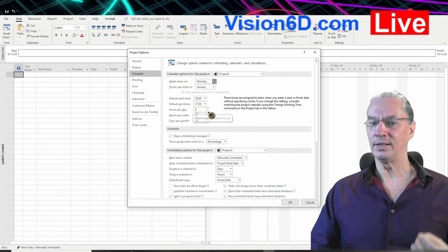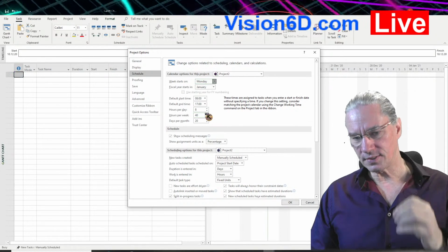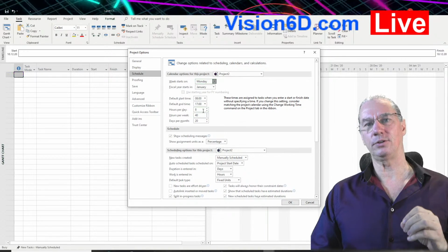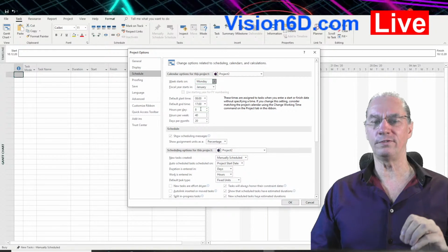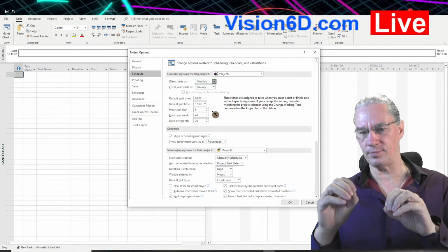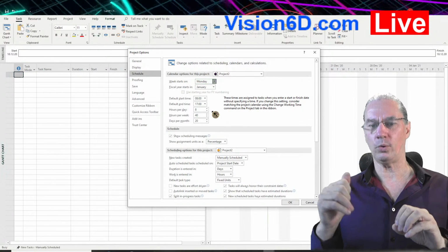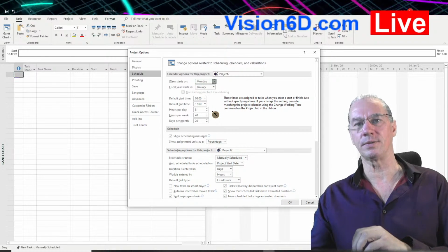Later on, if you decide to come back, it will still consider that you were defining 7.5 hours, and you will find those strange things in your diagrams and durations where 1 day is in fact 0.88 days.